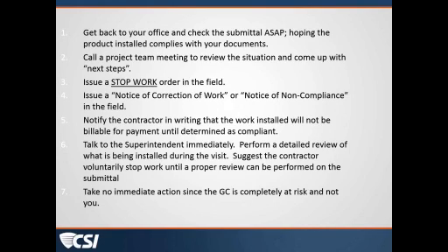Now, there's a lot of contract language in there, I understand, but paint and ceiling tile might not need to come to you at the pre-construction conference. And so when you talk about a review schedule, if you're able to set that up and agree on that, and then monitor that as you described through your progress meetings, then you have a great opportunity at being successful.